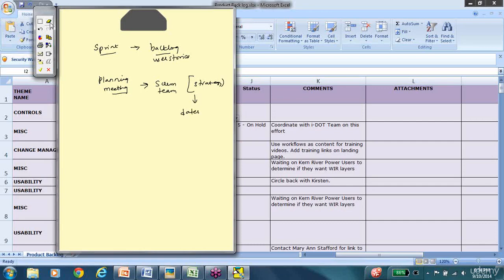So instead of writing a test plan document, a project plan document, a BRD, a FRD, this one sprint planning meeting will serve as an all-in-all orientation for everybody who is part of the Scrum team and the sprint on what we are doing, on what dates we are doing it, and what is expected. This one meeting lasts about half a day or sometimes even one day, but that is a necessary investment, because otherwise you would have to write the documents, send them for reviews, and communicate among each other again. So all that hassle is avoided by having everybody sit down in a conference room and discuss all these details. So that's day one of your sprint beginning.